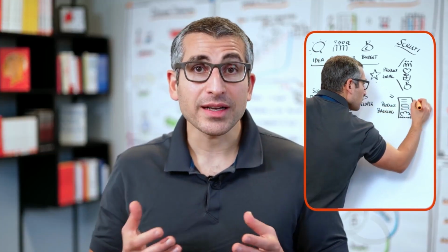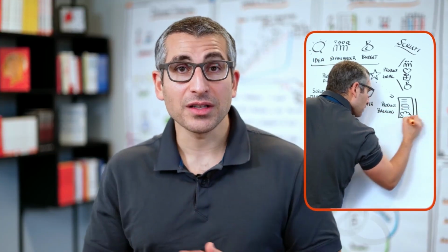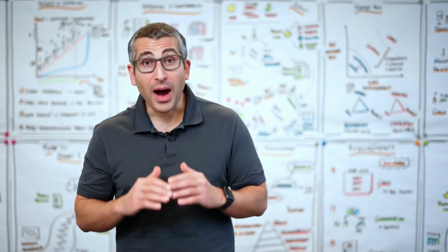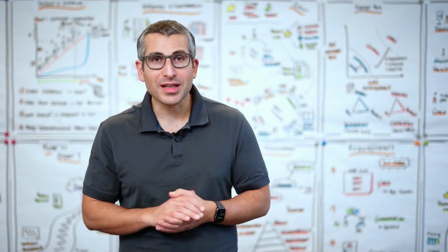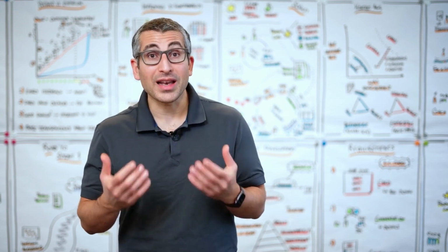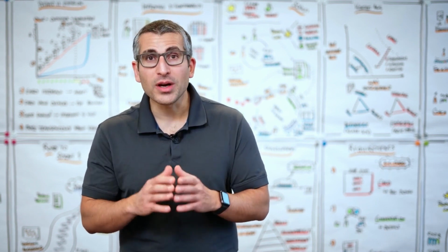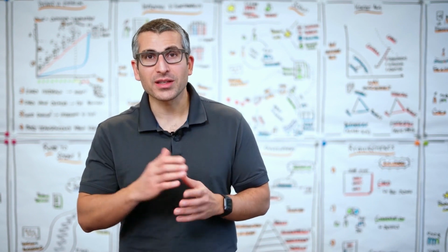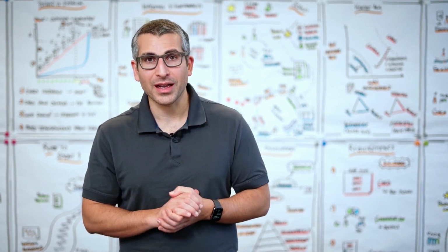Based on that prioritization, we detail the different requirements. The requirements that end up at the top should be very small and very granular, because a team should select them or should be able to select them into their next sprint. The items at the bottom can be still very vague. They can be cloudy. We don't need to have that level of detail, so we can also save the time which it takes to create that level of detail.